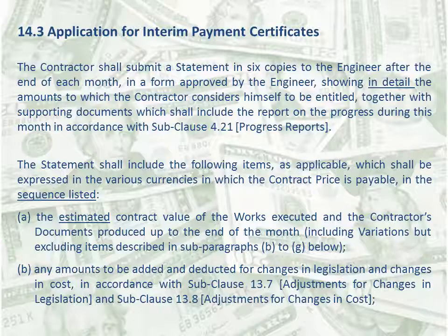And what is incomplete supporting documentation would be a question, because payment has to be made within 56 days from the submission of the statement. There is no time for requesting more details and back and forth correspondence if the submission is incomplete.